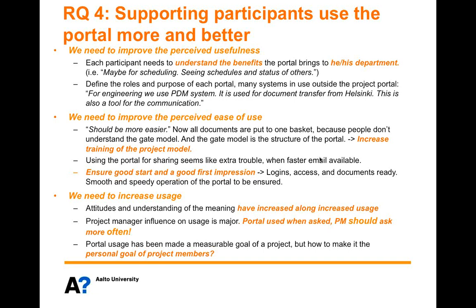And the third one is that we need to give some time to increase the usage. During the project we interviewed some people two times, in the spring and in the autumn. And during the summer, they had used the portal a lot. So the attitude and understanding of the meaning increased through the usage. The usage helped people to understand what's good.